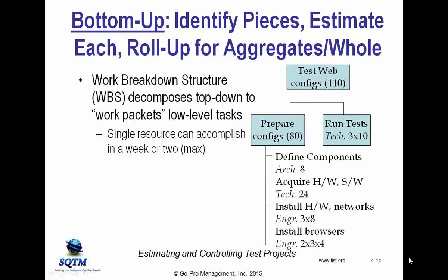Those are referred to as work packets. And so preparing configurations consists of defining the components, acquiring the hardware and software, installing it, installing the browsers, and so forth.